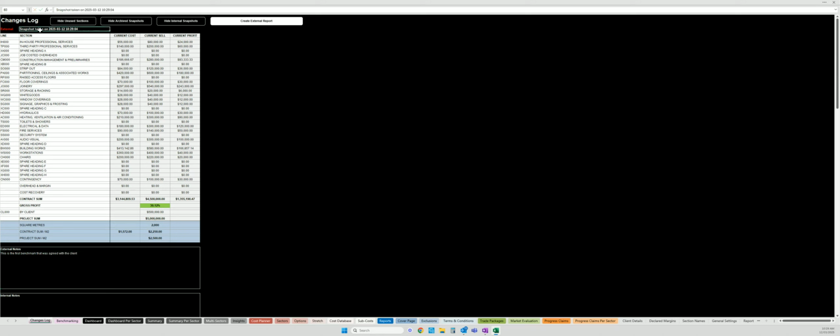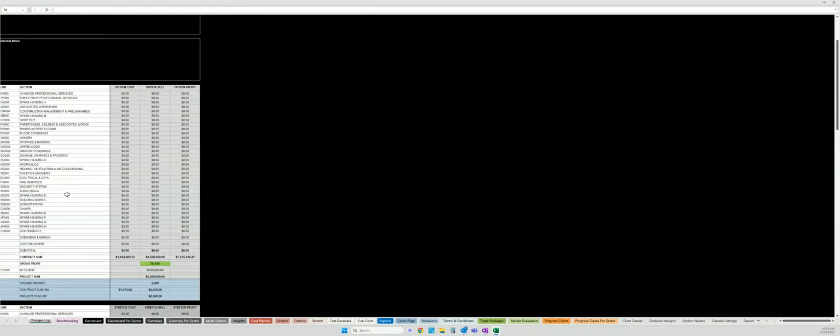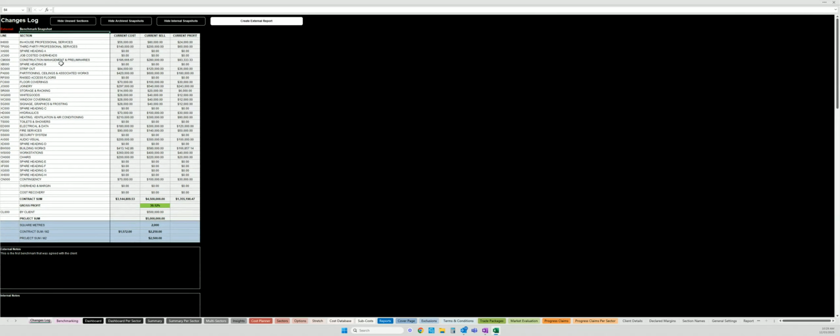We may call this benchmark snapshot. And so it's a snapshot of the project, and that is now in the system ready to be compared against. And so an example of that, we're now ready to cost plan our project. So let's quickly go into cost planning the project and adjusting some of these lines. We won't do it at scale, just to show you how you would kick off the project from there.